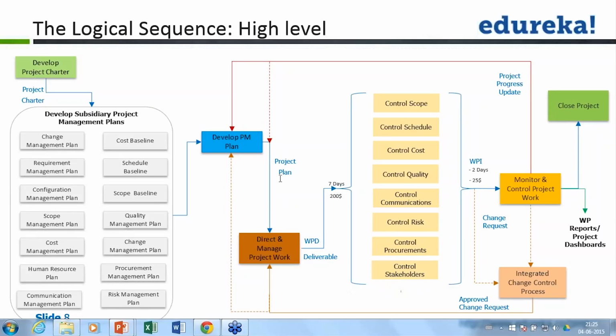So the project manager submits a request, but the customer, who is a part of the change control board, says, no, I do not want this resource to be changed. And whatever decision has to be taken, that decision must be taken in favor of the customer. That is the PMBOK guideline. That is a PMI guideline. After the changes are approved, if the customer wants to revert those, that will be another change request, which will again go to the change control board. Remember, for everything you will have to follow the process, and keep this in your mind when you are preparing for the PMP examination.